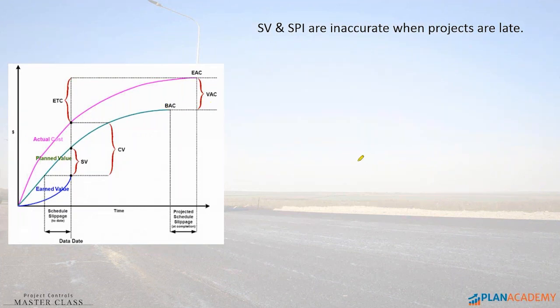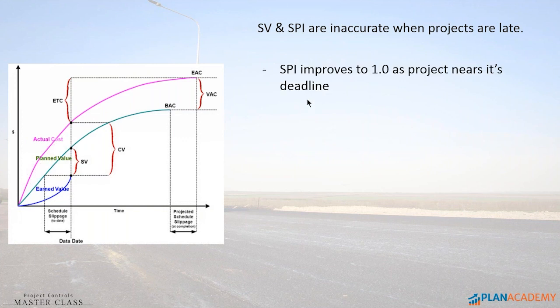SPI, if you remember, is a value where if you're performing exactly on schedule, the value is one. If you're behind schedule, then you're less than one — between zero and one. And if you're over-performing, your value can be more than one. But as we get closer to a deadline, if SPI has been low — meaning we've been performing less than one, meaning we're late — SPI always goes back to one. That's a limitation of schedule performance indicator.